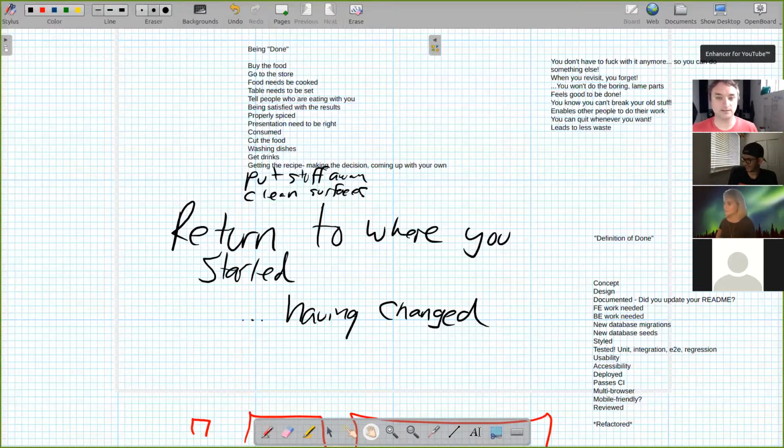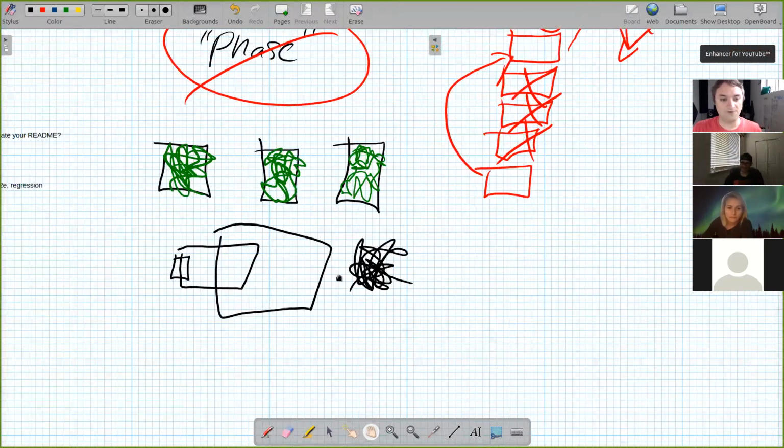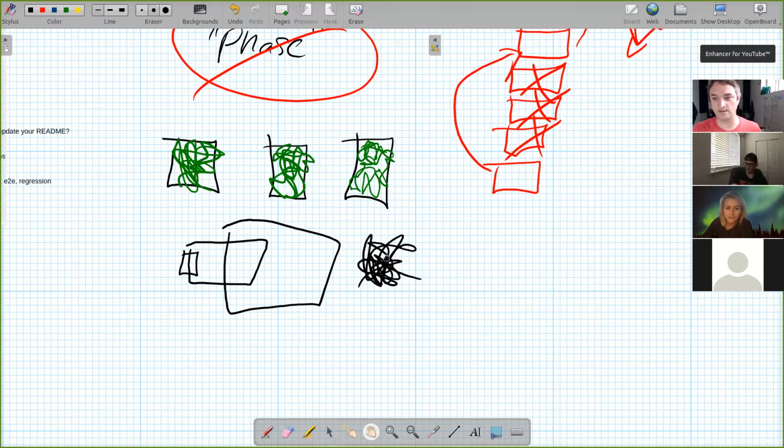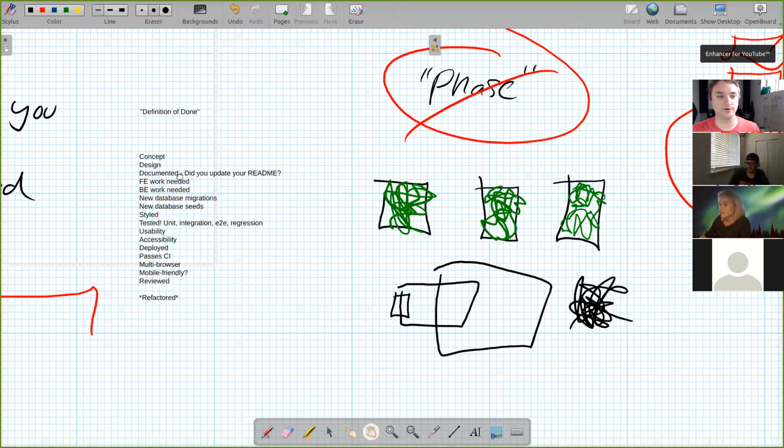Cool, very nice. So hopefully this is useful to you in your projects next week. It takes practice, but the biggest thing you're likely to mess up is making your slices too fat. And always remember, you know you're doing this right if there aren't a bunch of chores at the end. It can be chaotic within this, but they should otherwise stay pretty isolated. If they run into each other, or you got extra work you have to do at the end of the project, the slices were not so vertical.